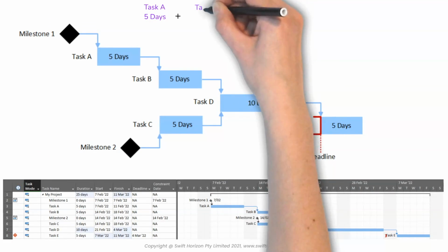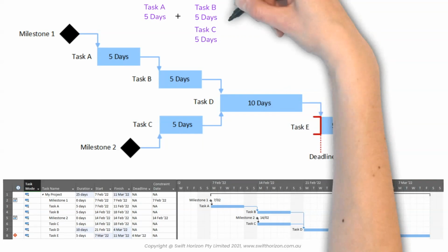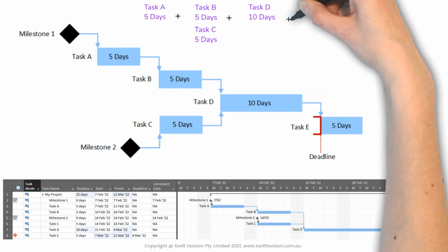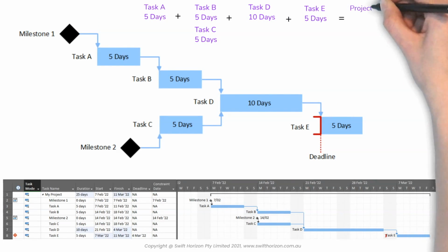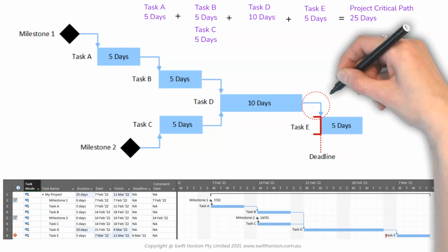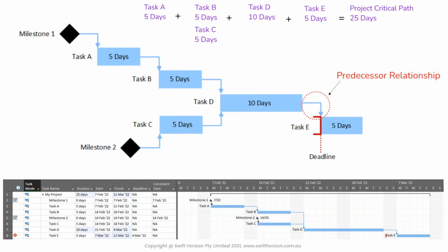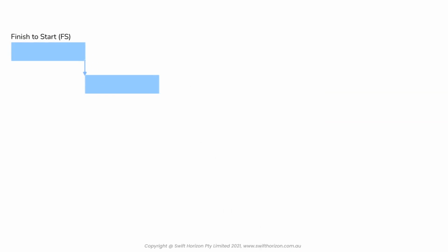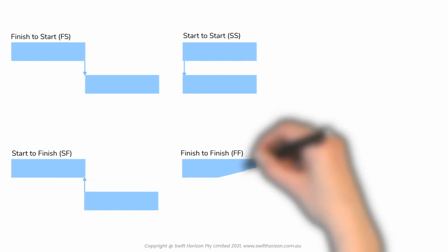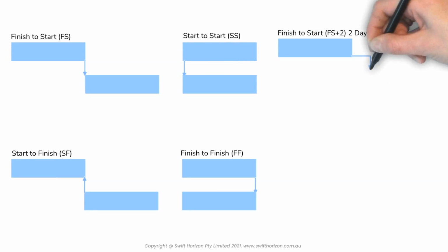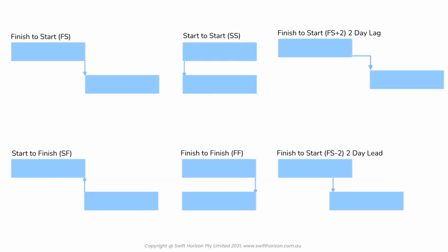Microsoft Project can forecast the impacts of downstream changes because we choose to use auto-scheduled tasks and the tool performs calculations based on durations and the predecessor relationship for each task. In simple terms, the predecessor relationship means that one task must be completed before the next task can start. Predecessor relationships can be finish to start, start to finish, start to start, finish to finish, and even have lead and lag days in the calculation.